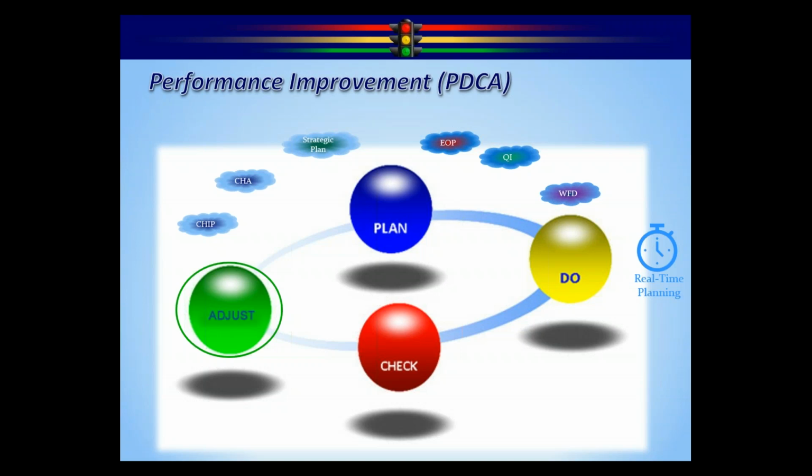And then the fourth option would be maybe a slight adjustment to the plan and the resources. So maybe the only resource we could do is convert the training to Zoom-based because maybe it's pretty easy to do. And then maybe we think that'll get us to a 23% target. So adjust the plan and the resources and continue through the cycle.